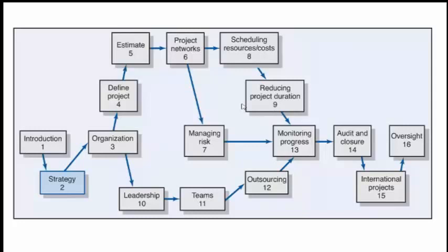Then you give certain values for those files. Based on the number of files, you come up with the data function point. Similarly, with the transaction function point, there you talk about what are the input transactions, how many input transactions. Each transaction will have what are the fields it is updating in your master files.